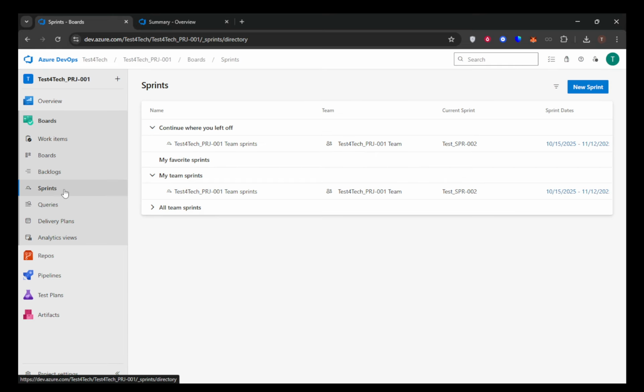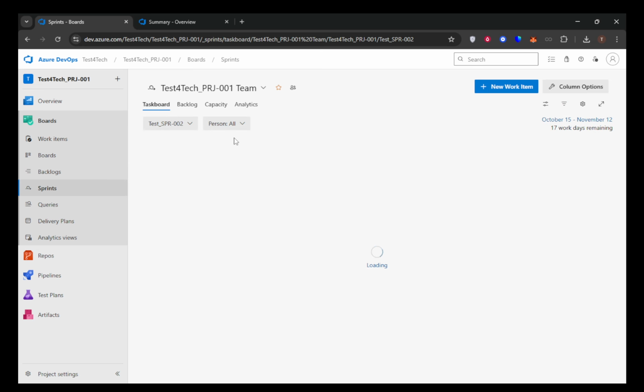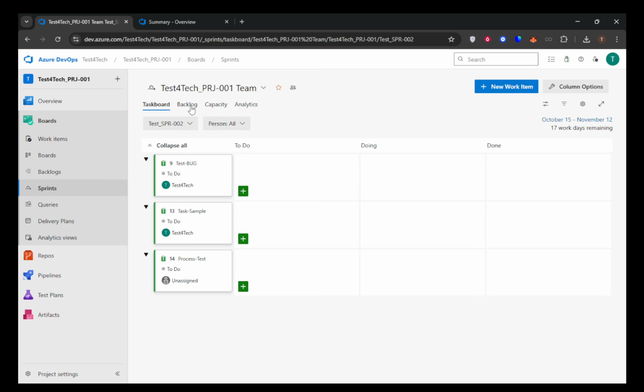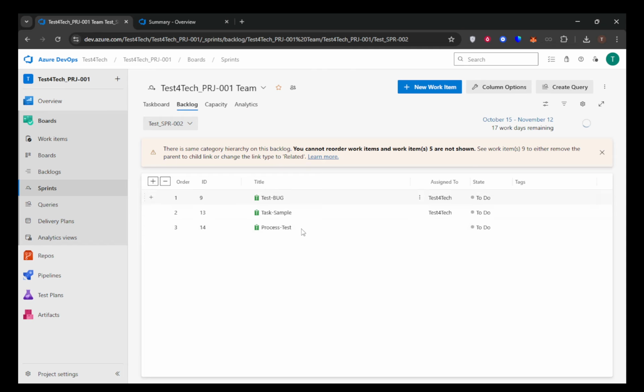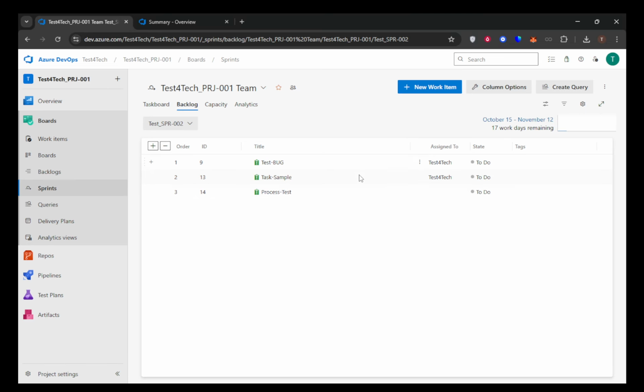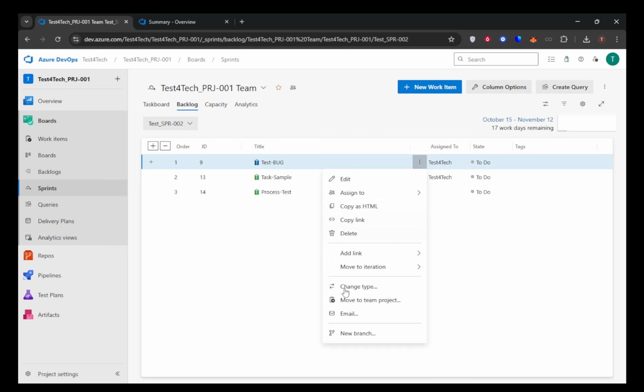What this means is you need to take a thorough look at all the items currently in the sprint backlog. Check the status of these items. They might be tagged as active, in progress, or completed. For any incomplete user stories or backlog items, you'll need to make a decision. Typically, this means either moving them to the next sprint or back to the product backlog.